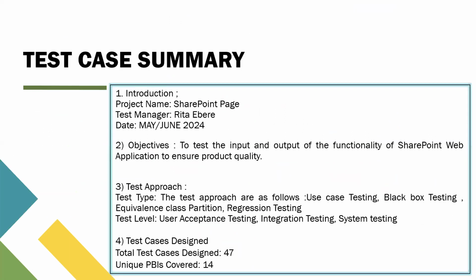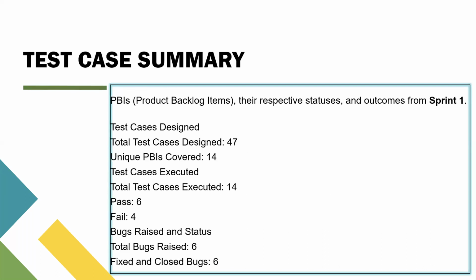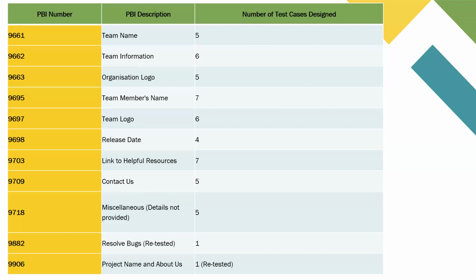First of all, we have a six-stage testing process. The first one was requirement understanding, where we were given the project to be worked upon. Everything was reviewed, the documents required. We identified ambiguities or inconsistencies in the requirements, and then as a team, we were ten in number, and this involved test planning and test strategy, whereby we used the test plan to determine the scope and risk and to determine the required resources and testing environments.